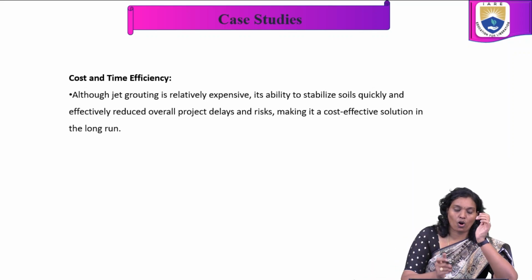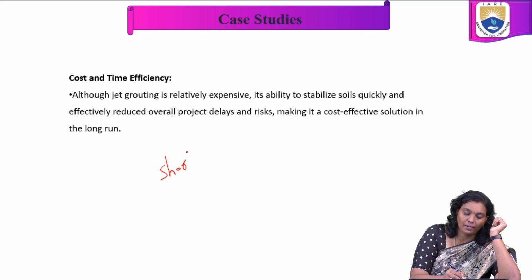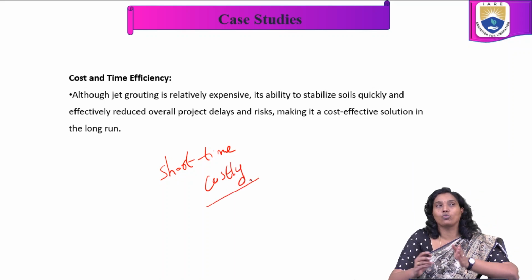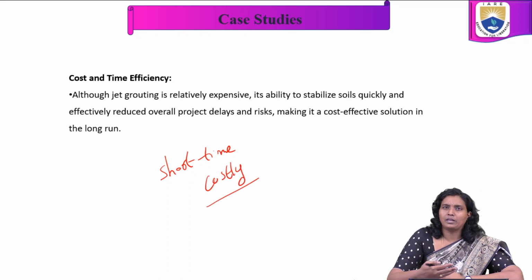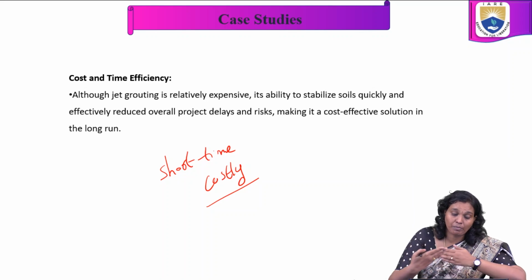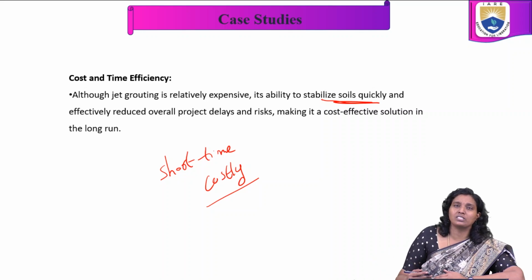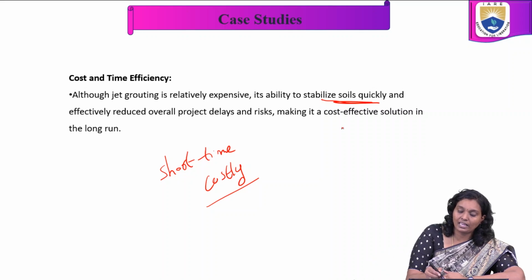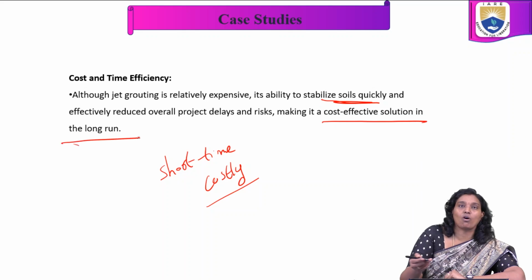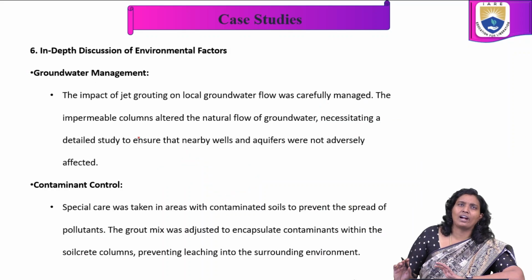Whenever we consider a short period, within a short time, it may look costly. But once we go through all the things over the period, because of its ability to stabilize soils very quickly within the timeline, it reduces the overall project delays and risk. So it makes a cost-effective solution in the long run. That is also something we have to understand.